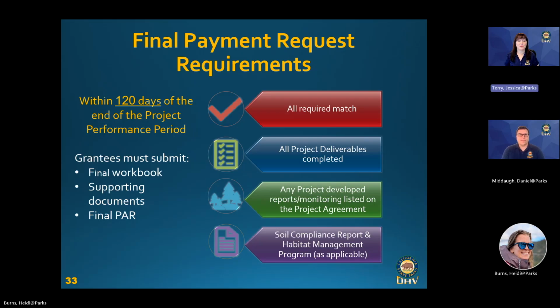And for your soils compliance report and your HMP, really good tip here. You do not need to wait until you submit your payment request to submit those documents. A lot of you are going to end your projects at the end of December. Obviously, the work stopped at that point, so no need to do any additional monitoring. If your scientists have finished your HMP or your soils reports ahead of time, submit those in. We can actually get those off to review to our environmental science team, and they could take up to 30 days to approve them. So if you beat the rush, you get it to them, those are approved.